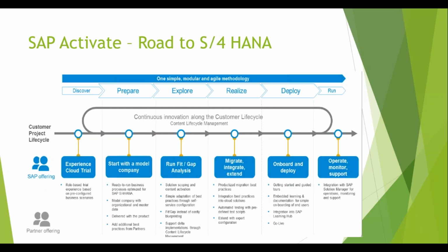But one thing for sure, it must highlight the fits, like whatever has been agreed, which will be used as it is. And you also need to highlight the gaps for which you are not able to provide the solution as of today. So that is called a fit gap analysis document.